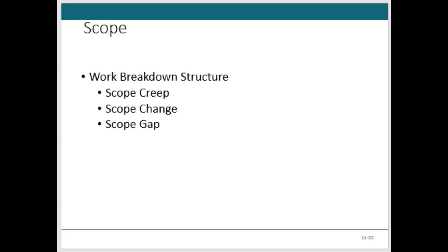So for cost control, the manager compares the budget data, for example, to the actual cash flows, the purchase orders, etc. Maybe looks at income reports or cost exception reports and the like. And these controls can then tie back to the work breakdown structure, where you added up the costs in the control accounts of your work breakdown structure.